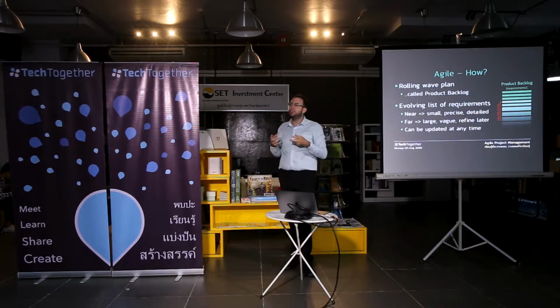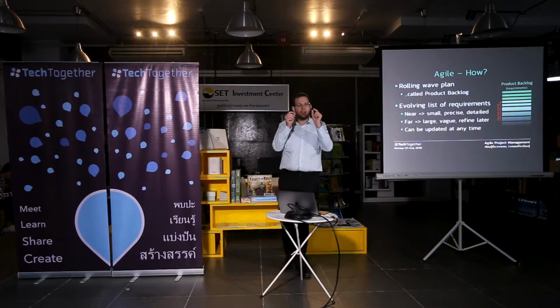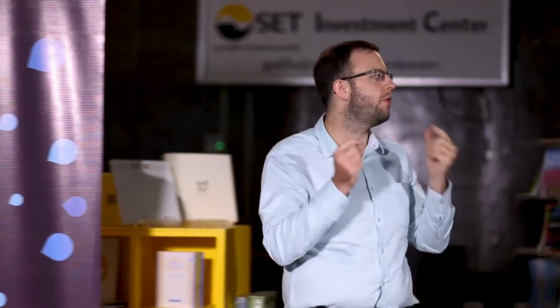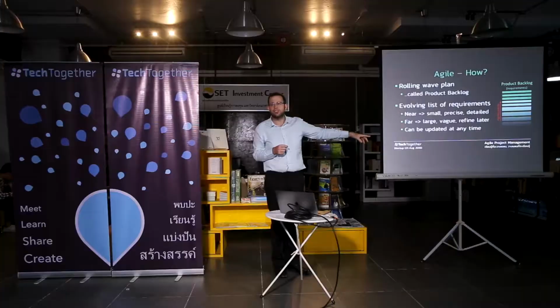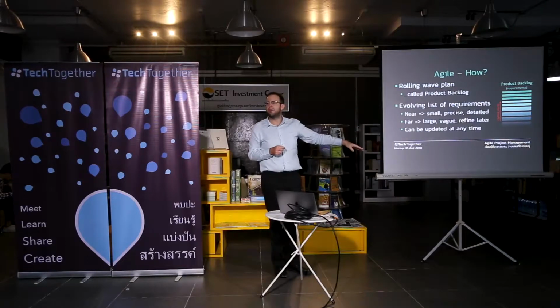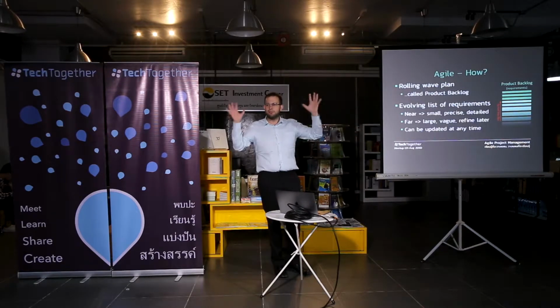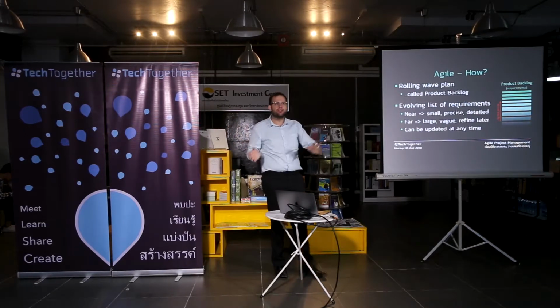So the things that you're going to do soon, you have a lot of granularity, a lot of detail, many, many small tasks that you know very well. The things that you're not going to do for 6 months, for a year, big blob of something to do, you just leave it. You come to it when you need to. You're not going to build it now, you don't put effort into it now.